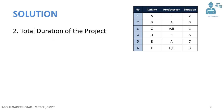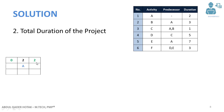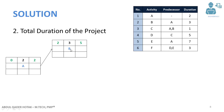The next question is: what is the total duration of the project? To find this, you should do a forward analysis. For activity A, the early start is day zero — from the day the project begins. Early start plus duration equals early finish. For activity B, which is connected to activity A, the duration was three. The earliest activity B can start is when activity A finishes, so the early start of activity B is day 2, which added to its duration gives early finish of 5.